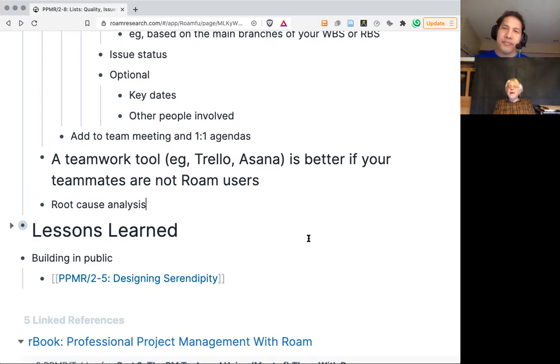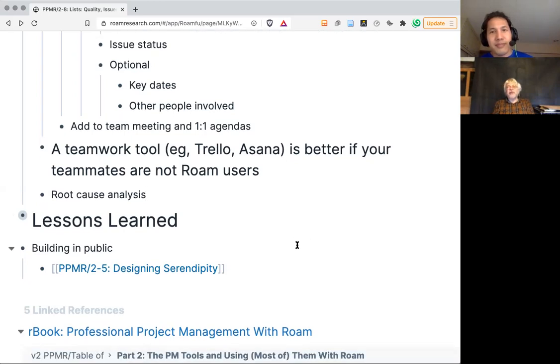As part of this project. And when we say abandon, it means we could move it to a secondary project for which we will give a code, for which we will ask money, maybe next year, and we will process again. That usually works rather well because customers are not silly. And then the discussion is what stays on the list and what moves to the other list. You try to reduce to something that you can manage, and you create a new work package, and you put this issue list in the work package, and you re-enter project mode.